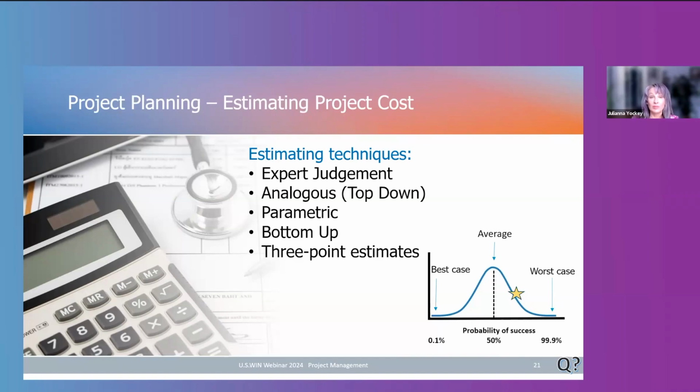So when it comes to money, people don't like large uncertainties. So most of us wouldn't commit to a project based on such a loose estimate. Where I think we're more comfortable around maybe a plus or minus 10% accuracy. And this then kind of allows us to set aside that extra 10% for some extra contingency money should we need it during the project.